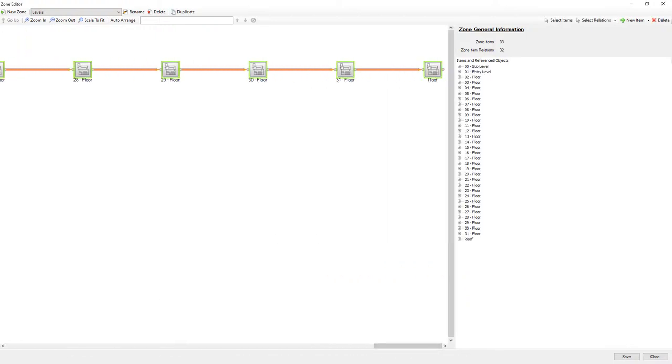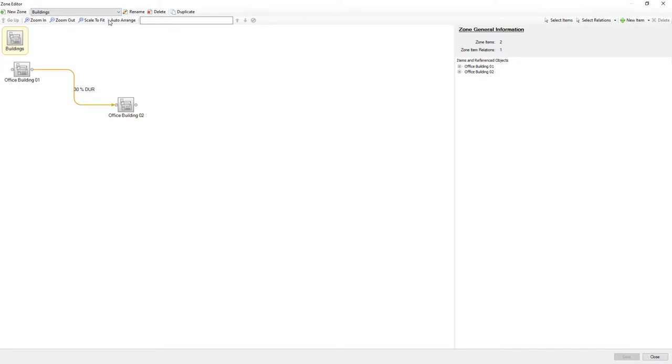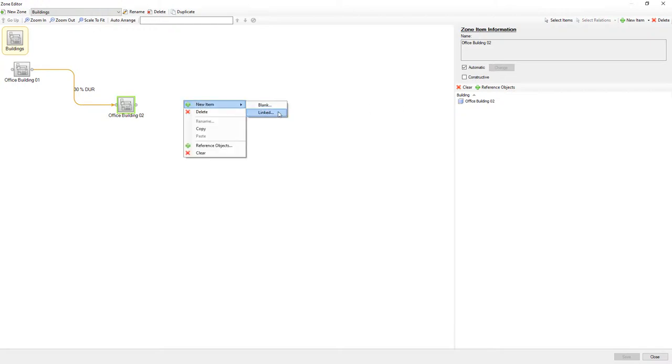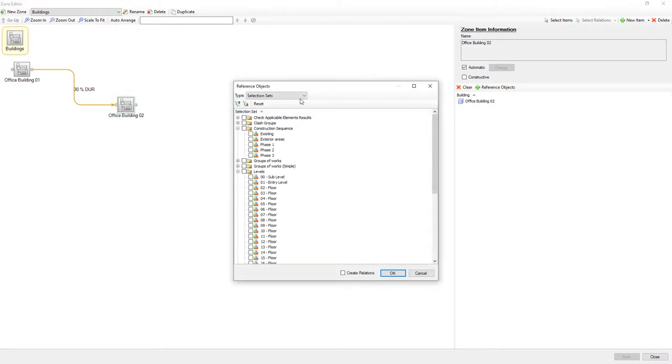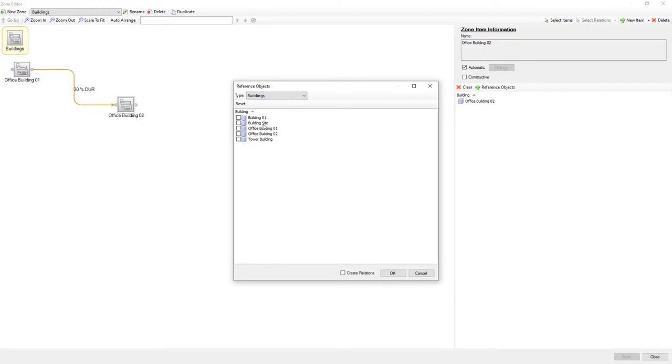The only thing now left is zone for buildings. Even though we used same modeling, naming and coding standards for this project, it's still different, at least in their physical aspects, so zones has to be always checked. This project also has more buildings and we need to add these new buildings to our zones if we want to see all these items in our schedule.